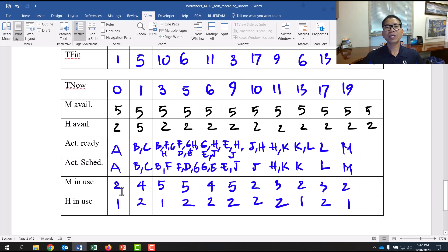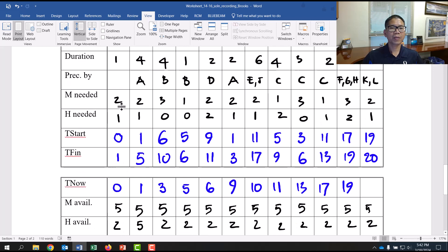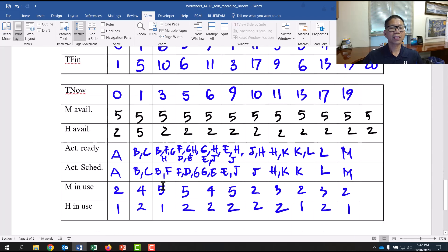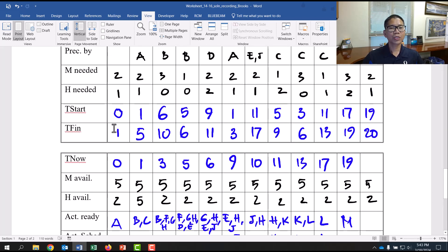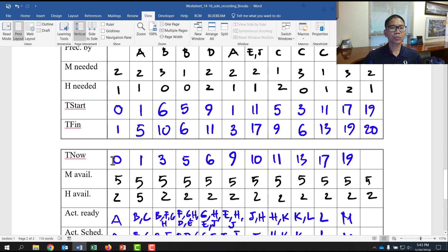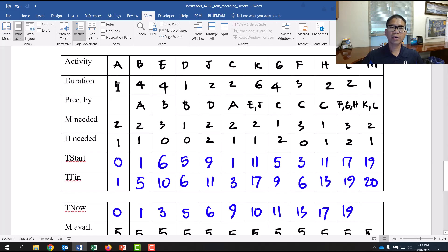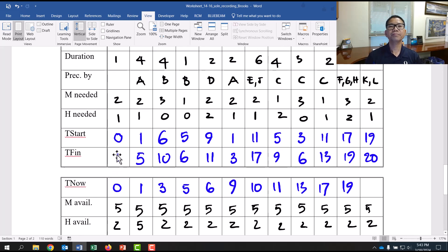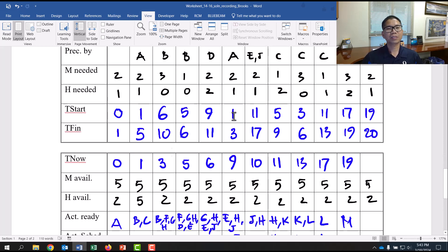When A is scheduled, mason-in-use is 2 and helper-in-use is 1 for Activity A — copied from A's resource need row. Activity A's time start is 0, duration is 1, so time finish equals 0 + 1 = 1. When time finish is 1, move to the next column where time now becomes 1.